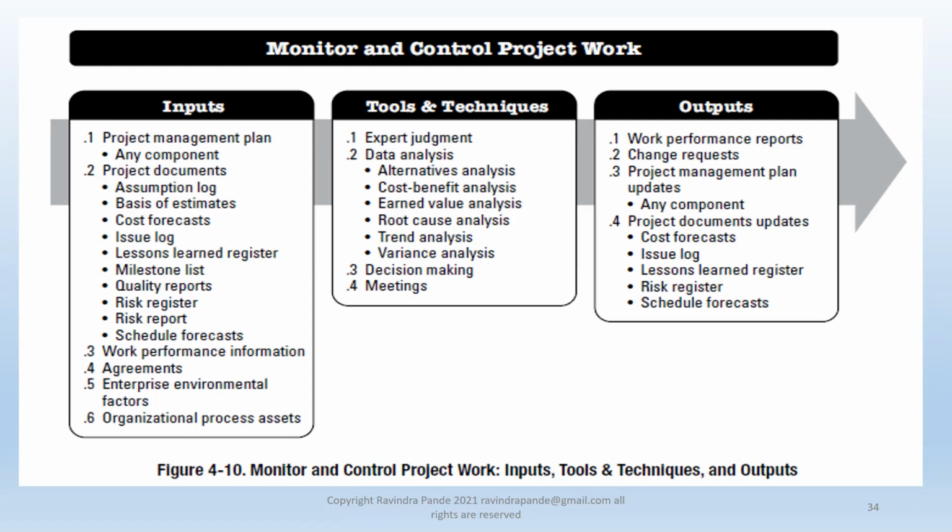And for that, we might need to validate all these bases of estimate. Why is Ravindra saying so many hours? In actuality, any SME or COE can justify that. Okay, when he says 3 hours, that's a reasonable time. If he says 8 hours, no, that's too much. We need to understand from him what his basis of estimate is. Then cost forecast. When you have a task, activity, schedule, and a resource attached to it, you can derive a cost.